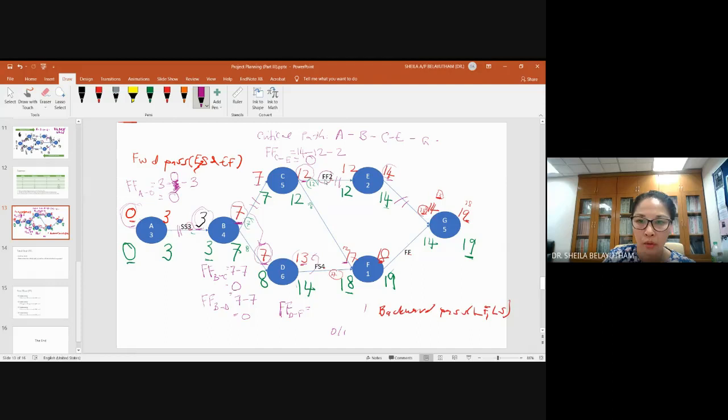So early start of the next activity, 17, minus early finish of the current activity, which is 13, minus 4 days lag, you should actually get 0. So free float for activity D would be 0. Let's try one more for activity F. What's the free float from activity F to activity G?